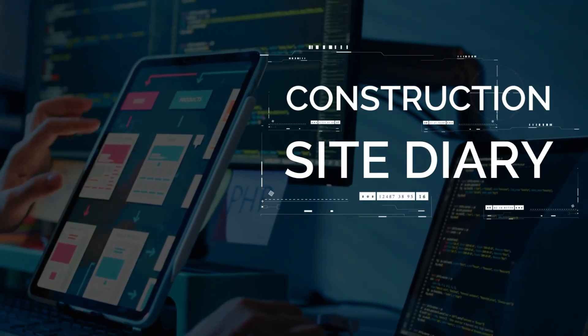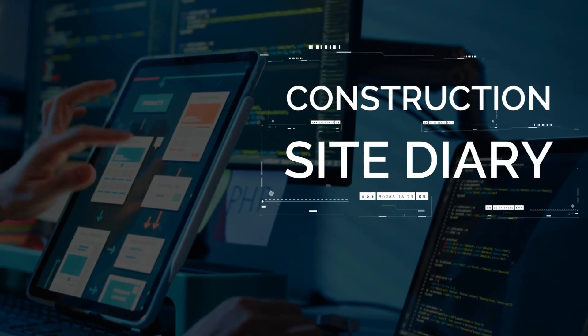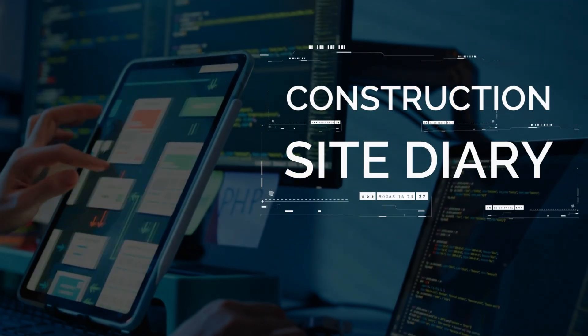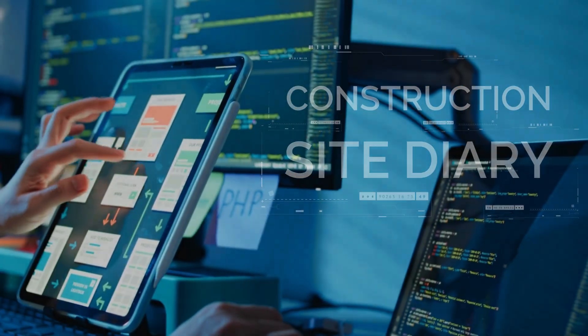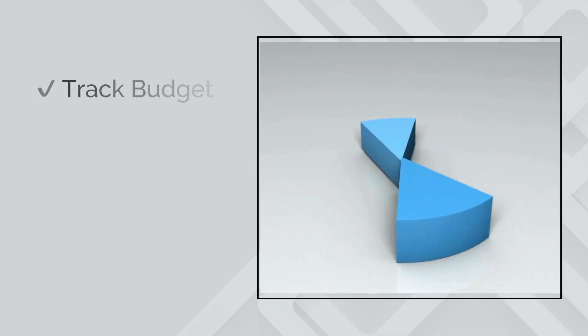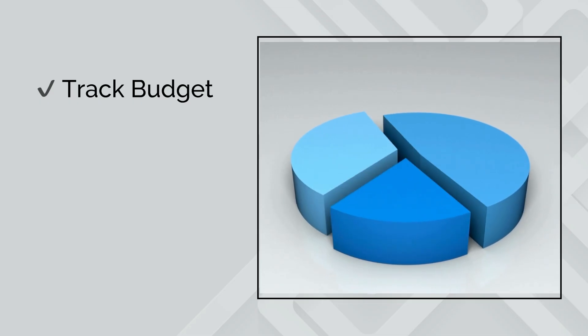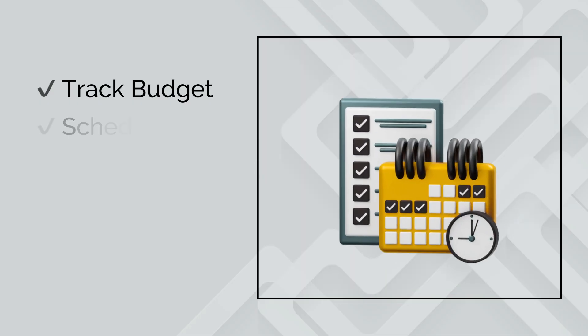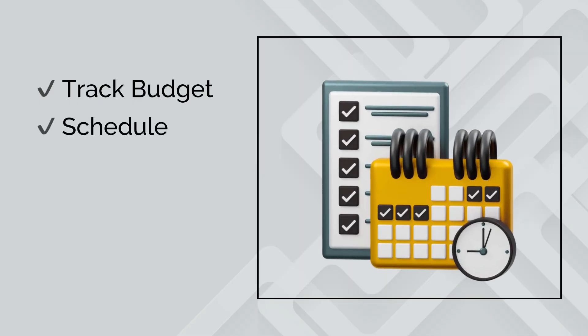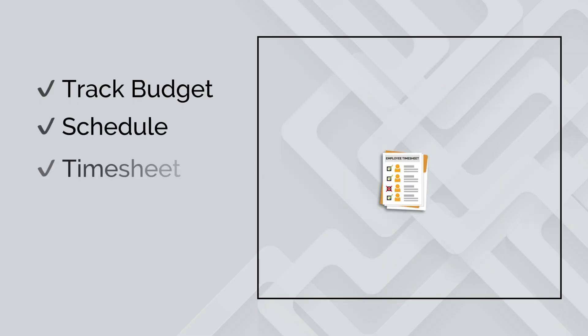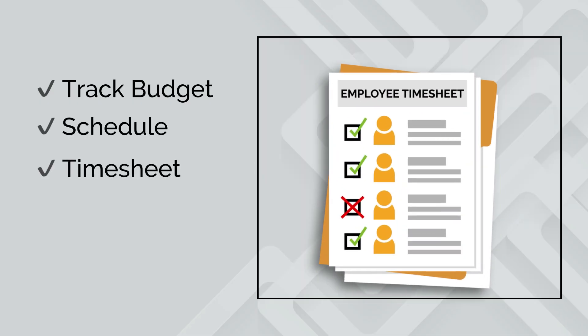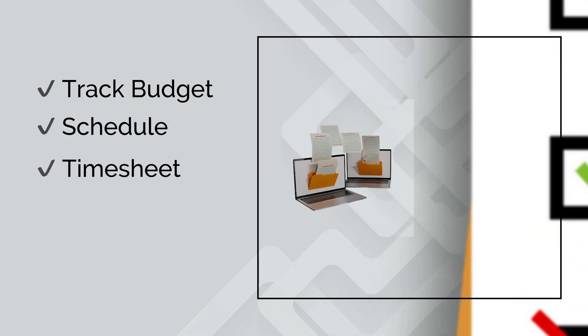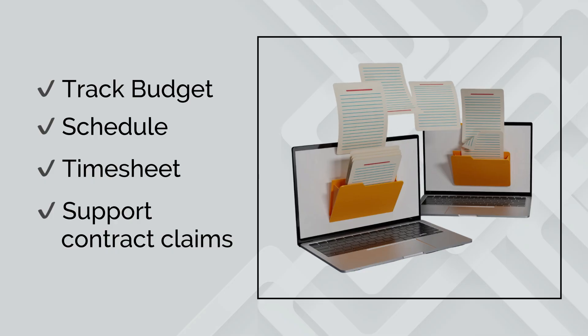Site diaries solve a ton of important problems for construction contractors. You can use them to track your budgets, your schedule, manage employee timesheets, and capture important records that help with contractual claims.